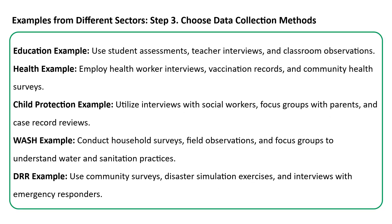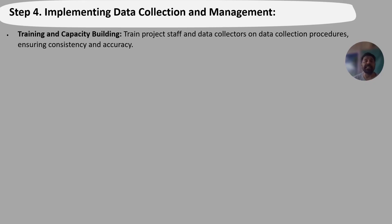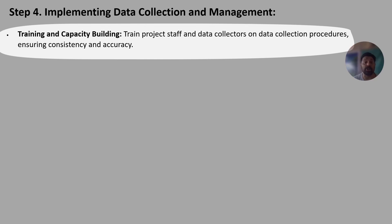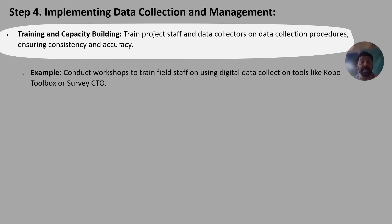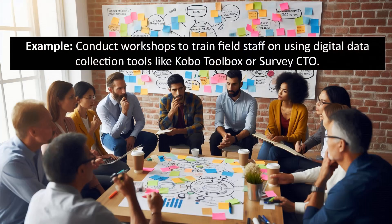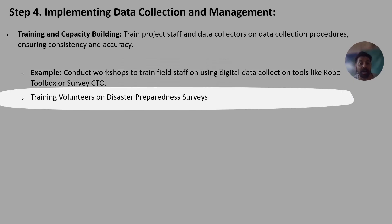Step four focuses on implementing data collection and management. Train project staff and data collectors on data collection procedures to ensure consistency and accuracy. For example, conduct workshops to train field staff on using digital data collection tools like KoboToolbox or SurveyCTO. For a disaster preparedness project, train volunteers on conducting disaster preparedness surveys.